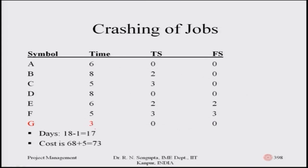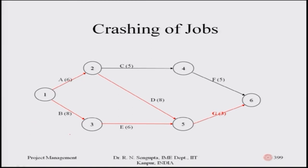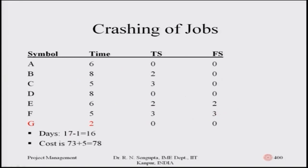We continue reducing G: from four to three, the cost increases by eight units — from seventy-one to seventy-nine — and the duration goes from eighteen to seventeen. Then G is reduced further from three to two: cost increases by another eight units — from seventy-nine to eighty-seven — and the duration goes from seventeen to sixteen.